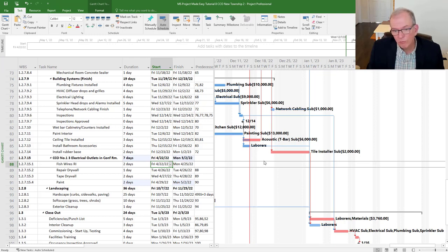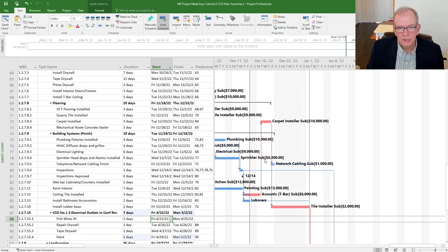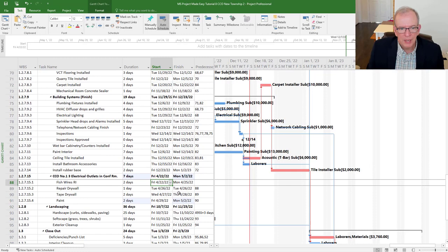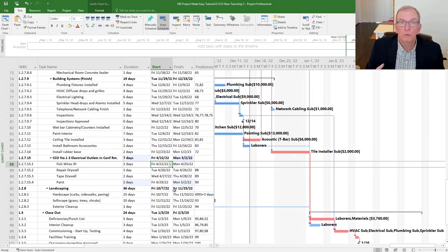Now, if this is going pretty much very close to your status date, you could put a constraint. There wouldn't be anything really wrong with it. So that's probably one of the exceptions, I would say, that I'm not worried about it canceling out my critical path. At worst, it's just going to show this little section may be canceled out because the critical path won't display if something ahead of it has a constraint that locks it up.